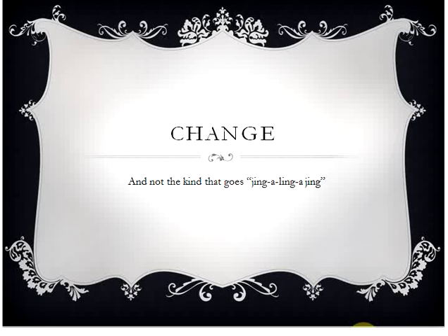A little bit every day will start to prepare them. About education, you need to make a decision if that education needs to be tracked, or maybe make a recommendation that the education needs to be tracked. It's something that may prevent you from putting in a change right away. If it's a quality measure, core measure, or a process improvement that could affect patient care, both positively and negatively if done wrong, that education may need to be tracked before it can go live.